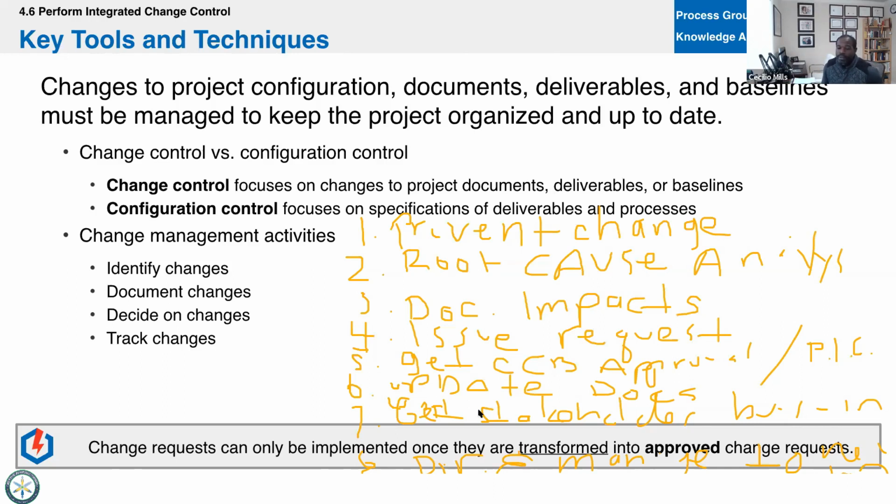It's usually that impacts need to be analyzed and documented, or you need to issue the request, or it'll straight up say you've just issued a change request. What should the project manager do next? And then, okay, if you've issued the change request, go get approval. All right.